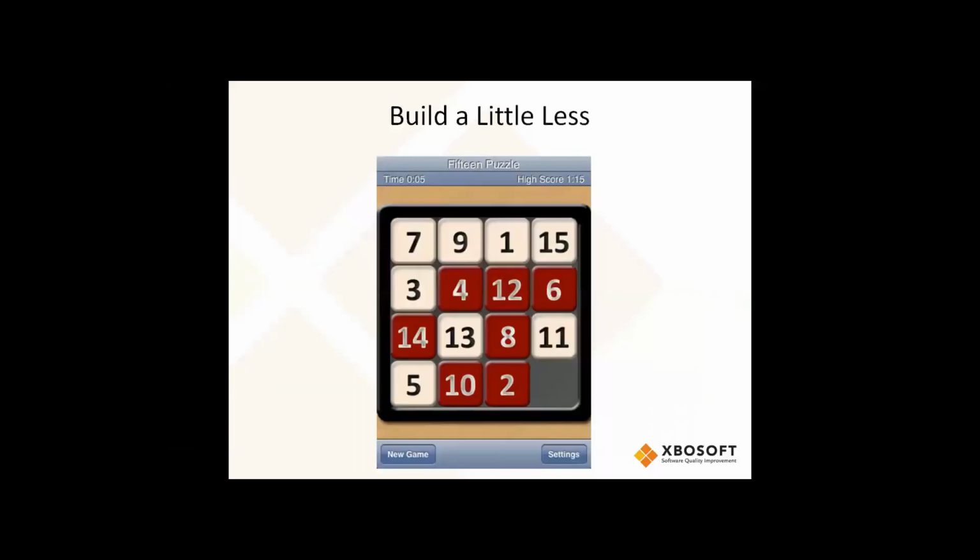When you fill that square and you overfill the square, you're going to see bug rates climb. You're going to miss your deadline because you've taken on too much in too little time. But if you leave an open square, you'll tend to have a smaller and shorter Rayleigh defect curve. So here we are, going into the home stretch, and then we'll open it for questions.